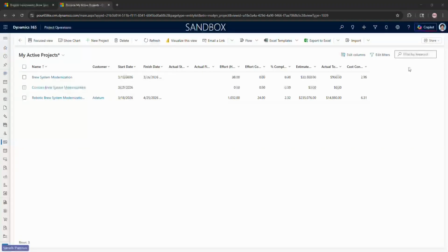The only way we could use something as a template was to use copy project APIs and then copy that template to create a new project. The drawback was it always created a new project and it always copied the complete work breakdown structure, without giving capabilities to the project manager to pick and choose tasks they want to bring in and update the project that they want to. With this feature named import tasks from projects, we are now filling that gap within Project Operations.